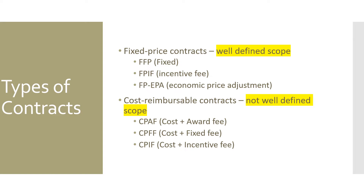There are different types of contracts. Fixed price contracts are used when you have a well-defined scope. Firm Fixed Price (FFP) is straightforward — a set price for the project. Fixed Price Incentive Fee (FPIF) adds an incentive if the project is completed within a certain percentage of time or cost. Fixed Price Economic Price Adjustment (FP-EPA) is used for longer projects — two to three years — where you adjust the price based on macroeconomic data like raw material or commodity prices.